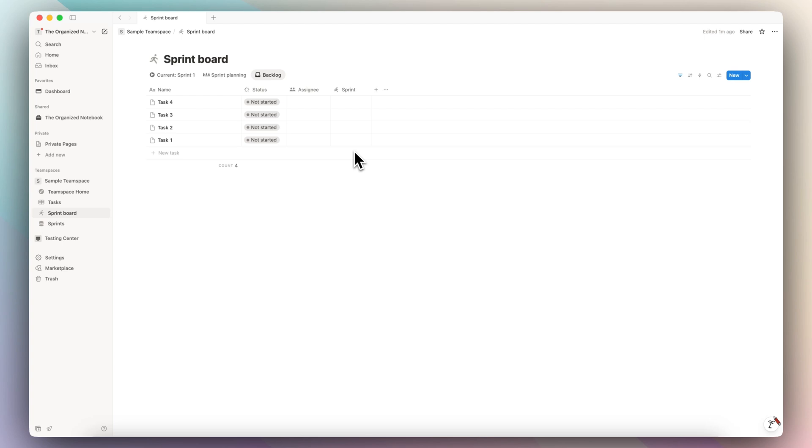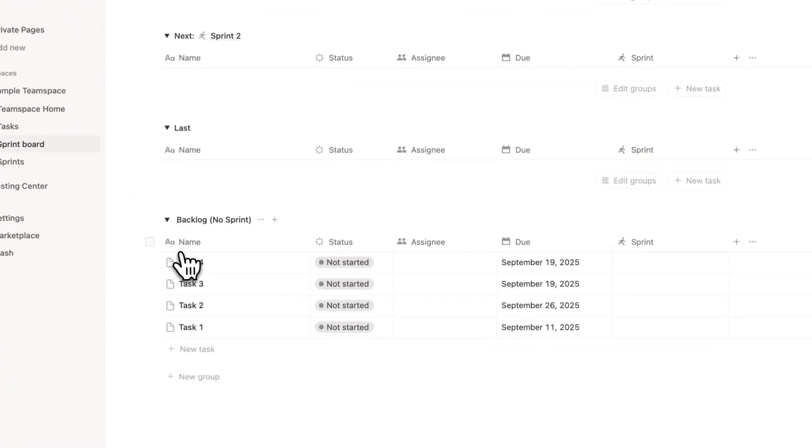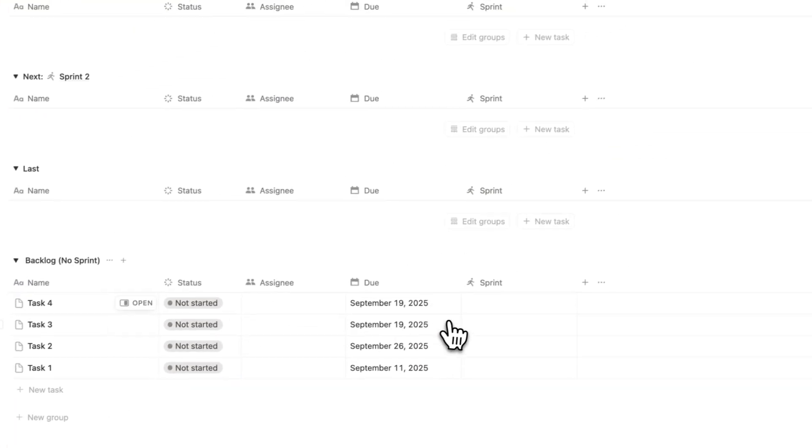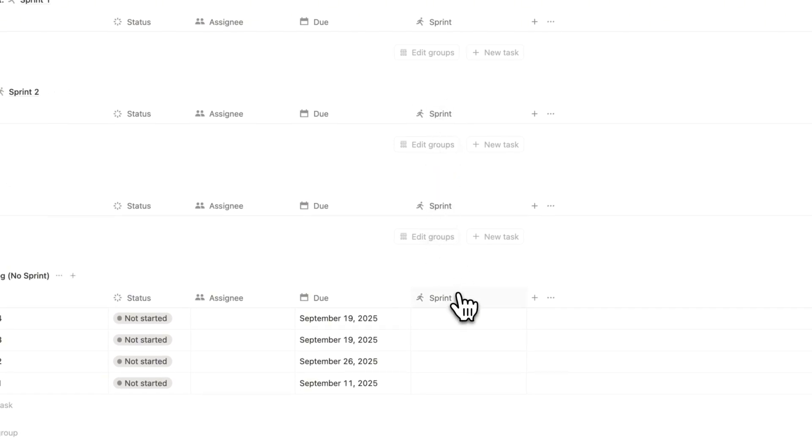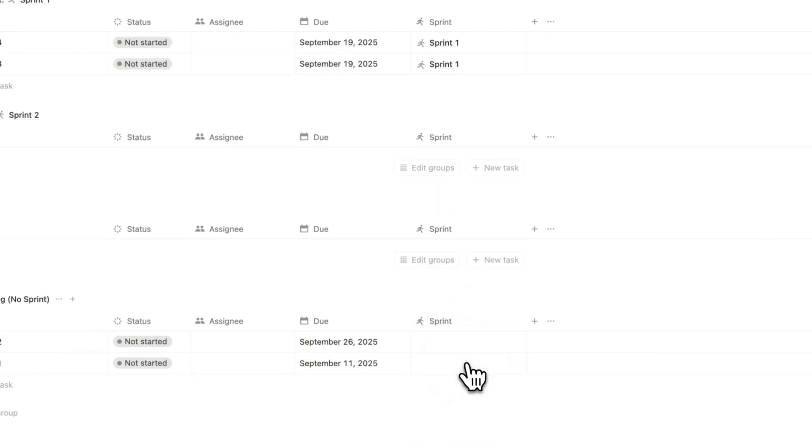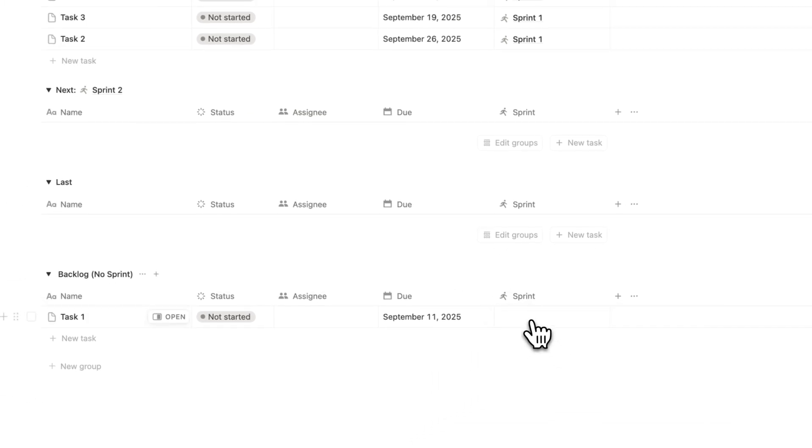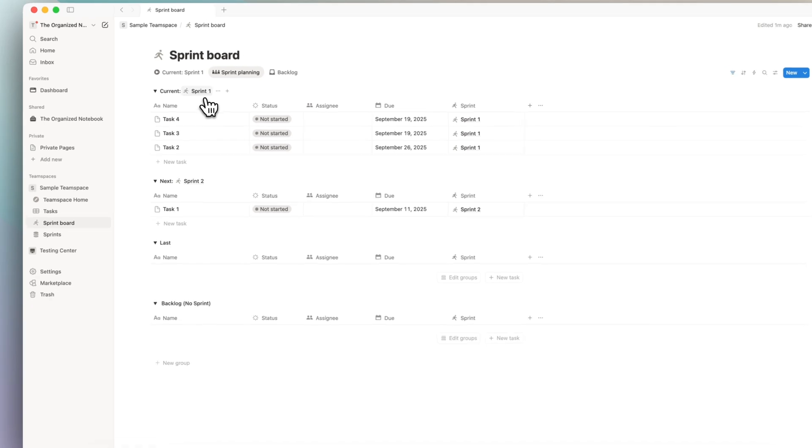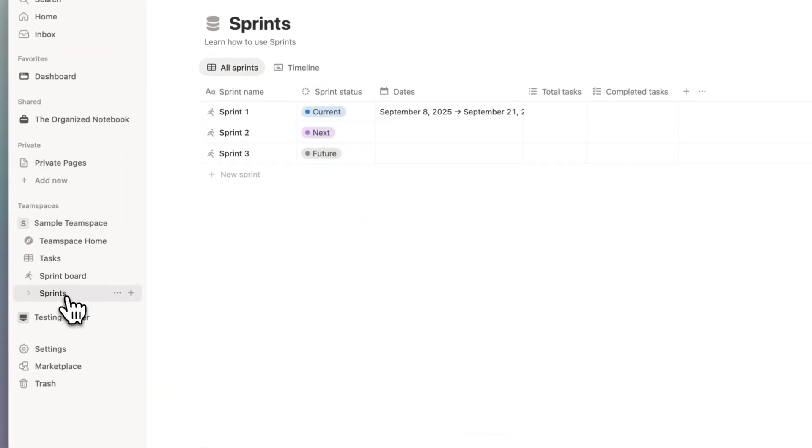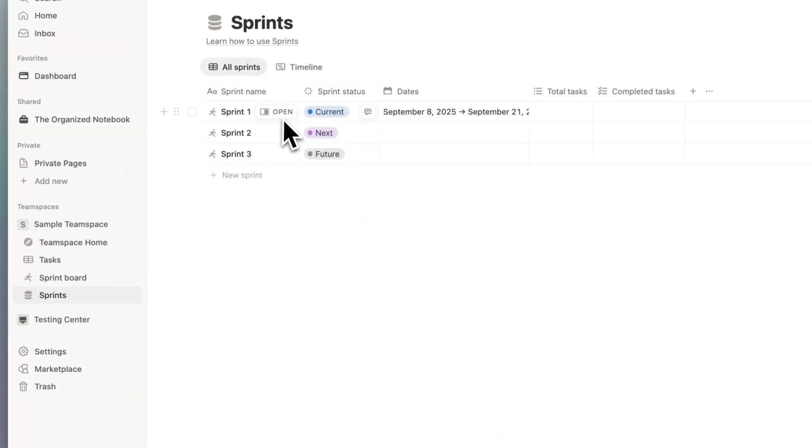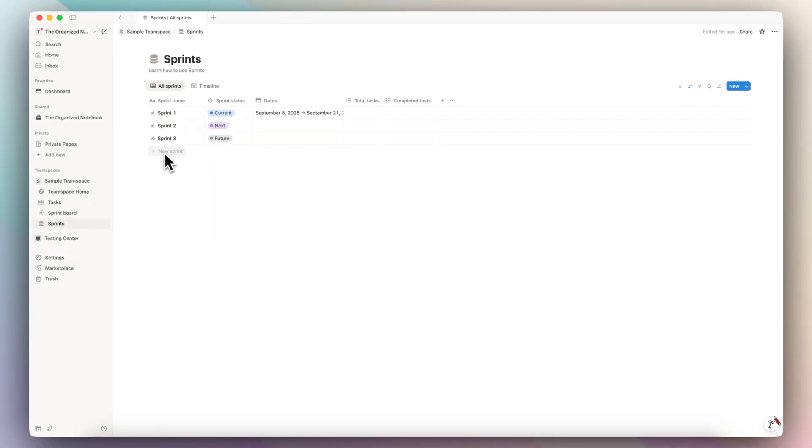The first step to doing this would be to go to sprint planning, then check the backlog and start assigning them to different sprints. I'm going to assign this one to sprint one, and then I'll assign this final one to sprint two. As you can see, the current sprint is sprint one, the next sprint is sprint two. If I click sprints, you'll see the current and then the next sprint, and this way you can plan for future sprints as well.